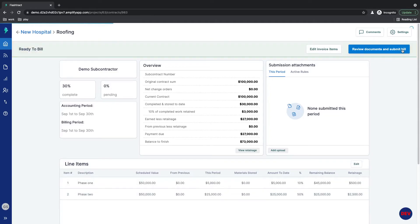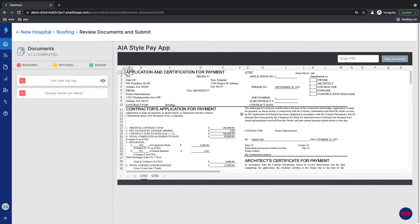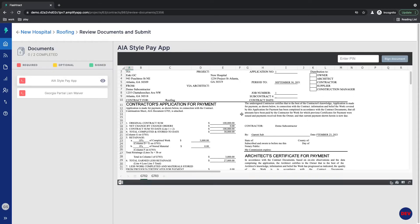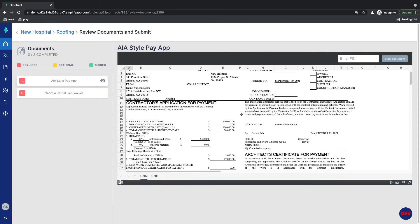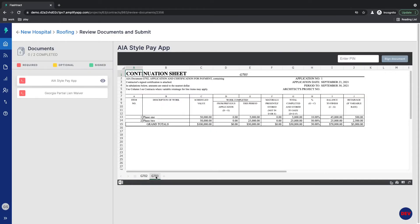Click Save. Then Flashtrack takes all that information and automatically generates a G702, G703 schedule of values for you.